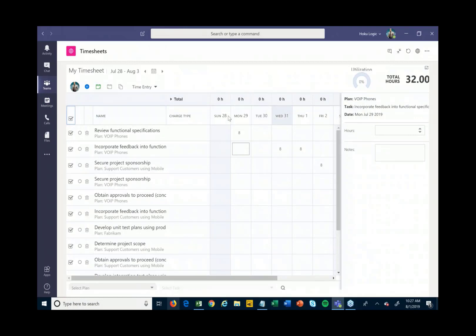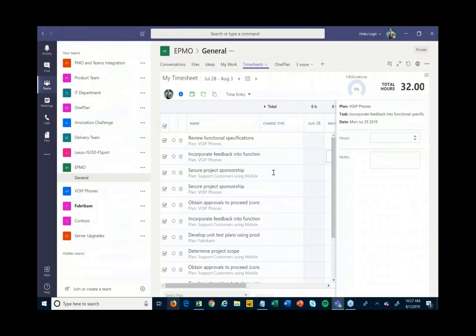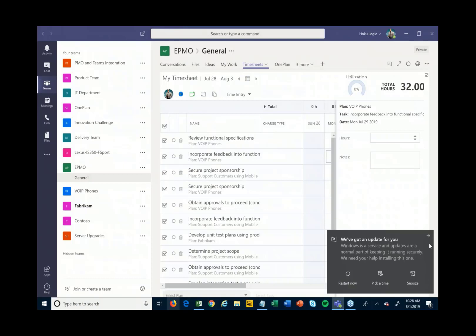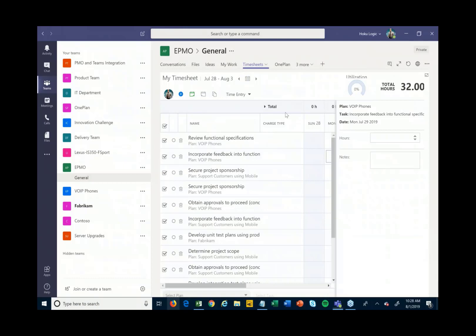At the end of the week, I can come and hit Submit and route this through an approval process to get all my time filled out. When that all tracks and flows all the way back into those project schedules we showed earlier, we can see how much time is being spent and translate that into cost if needed.